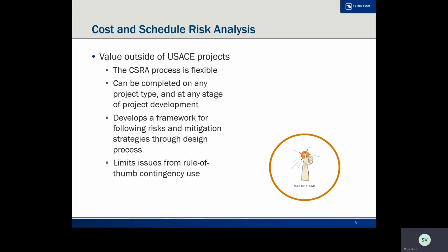Some other potential benefits for completing this analysis include the fact that the full process is flexible. There are some key components like developing the risk register that are pretty standard to all risk analyses, but other parts of the analysis can be substituted or removed or modified to better fit a project's needs and a project's budget. This analysis can also be completed at any stage of the project development timeline.